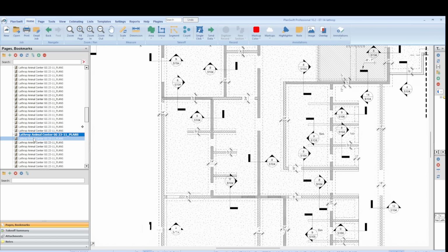When I talk to my clients, what you need to understand is that a takeoff tool is nothing more than a ruler. You don't want your takeoff tool to not only measure, but then determine the material cost, because that always changes. So once you put it in once, you've got to keep putting it in. Don't put it in. This is a ruler. Use it as a ruler. You should have another system for material costs and another system for man hours. So buy the cheapest ruler you can get, is my whole point.